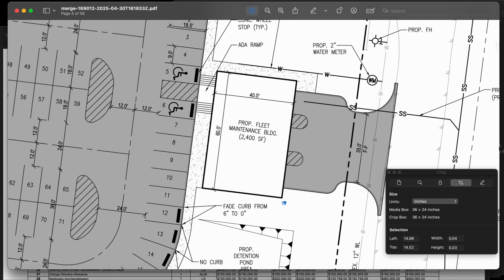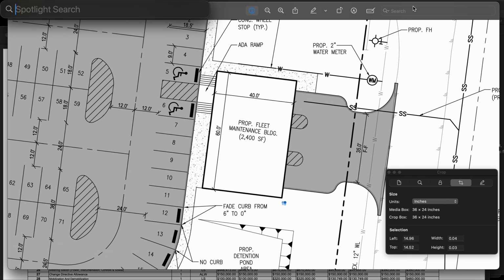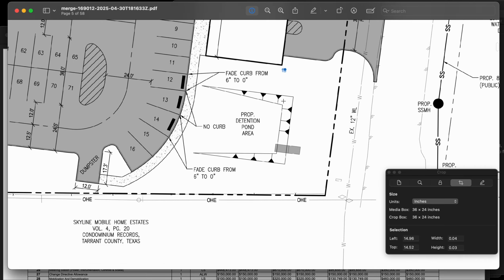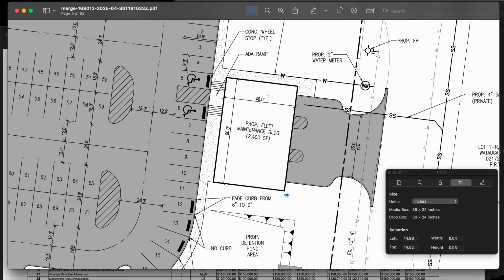So 50 by 70. Let's see, 50 times 70. Yep, 3,500 square foot building. We roughly added 1,000 square feet. That is where a lot of these guys make mistakes. They only go up to the building corner in that instance. Of course, this job site is asking also for the 8 inches of flex space. Not going to make the same mistake as on the last job where I only gave it 6, but you know the deal here.